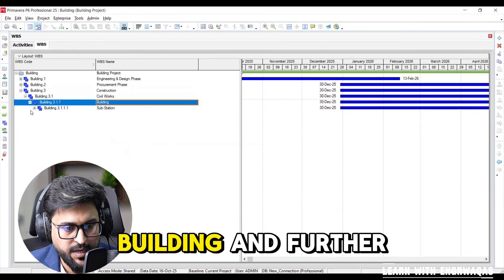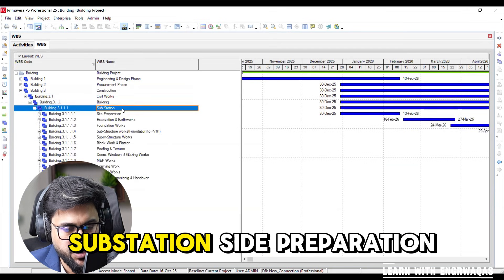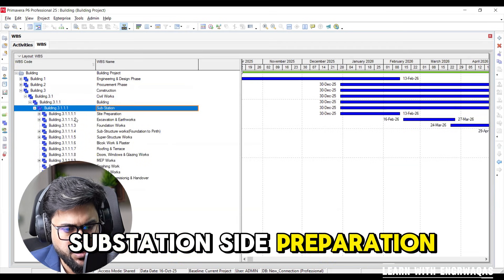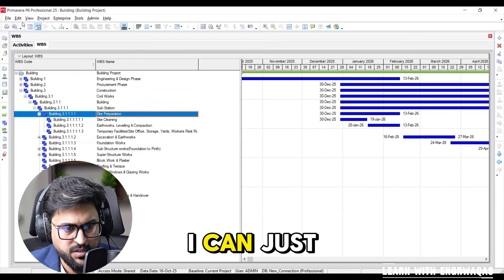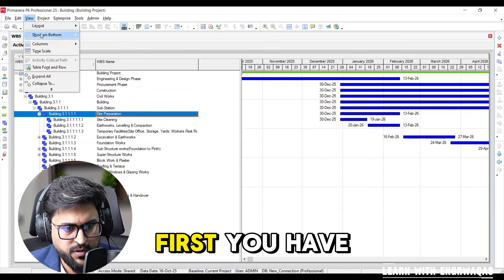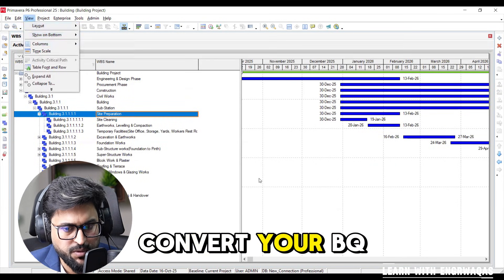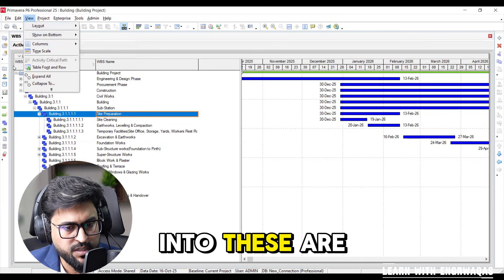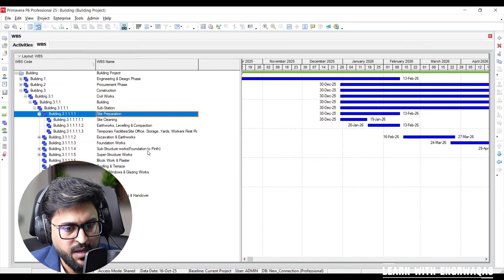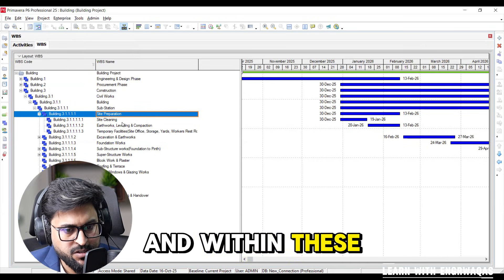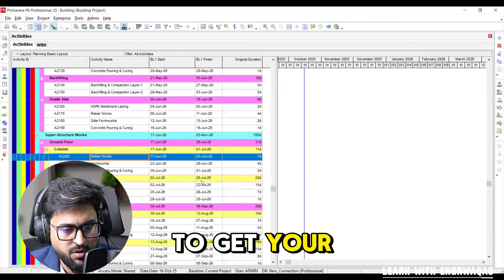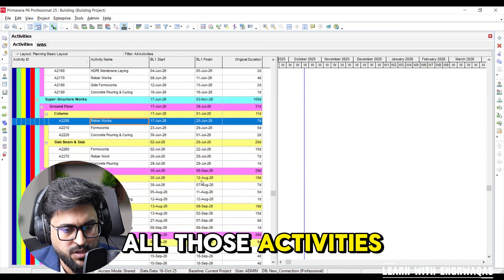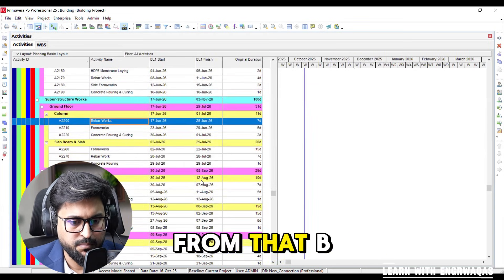Construction has been subdivided into civil works building. Further building has been site preparation. You can see that first you have to convert your BOQ into these WBS major levels and within these WBS you are going to get all those activities taking from that BOQ descriptions.